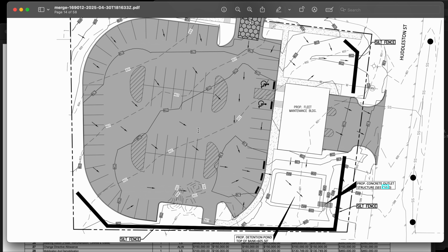So if you're not too sure what your mobilization price should be, do everything else first, and let's see if it's like 150,000, then 5% of that would be like 7,500 or around there, or a 7 if you want to go up to like 10,000.